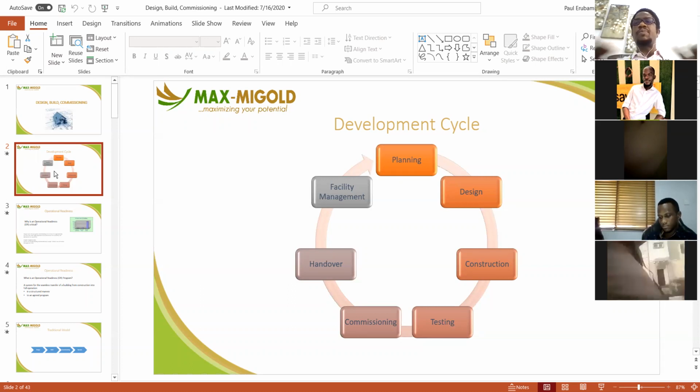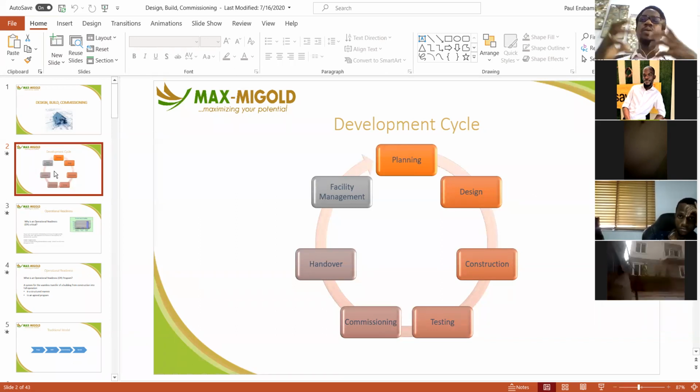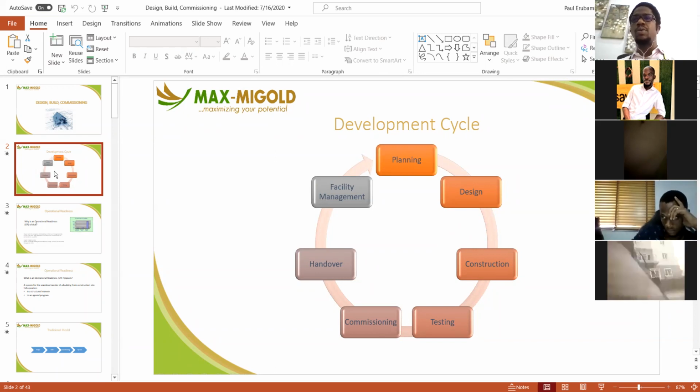After they've accounted for all the space requirements from the brief, they go back and forth with the facility managers and the owner on the process of developing the finalized floor plans, what the elevations should look like, what the sections and other perspective views should look like. When they are done with the design stage, the design work is not finished until you've had architectural drawings produced, mechanical and plumbing drawings, electrical drawings, structural drawings, depending on the kind of building you're trying to develop, and then the site drawings detailed.